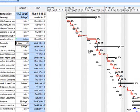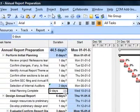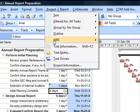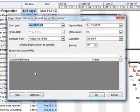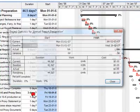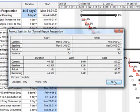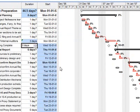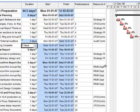If I now go and see Project Statistics, it will be very clearly seen that there is a variance of two days. If you would like to see baseline values for each and every task, then you can easily insert baseline columns.